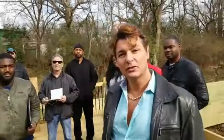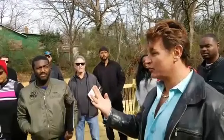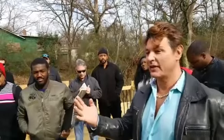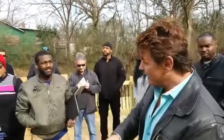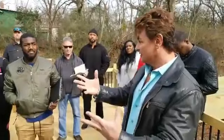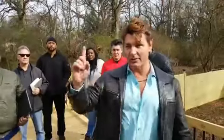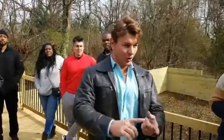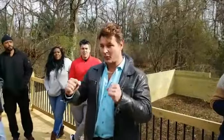So how big are your crews? You've got four of them. Well, when I say crews, the key components of my crews are my carpenters, because they're doing 75% of the work. Then I've got roofers, electricians, plumbers, heating and air, kitchen guys, flooring guys, tile guys. Does that make sense? Those guys can float from job to job. But the guys that are normally on my job would be the contractor guys, who also do my punch out at the end.